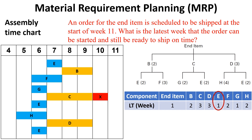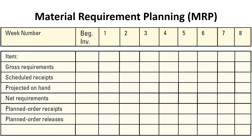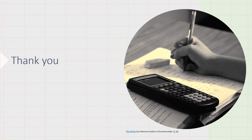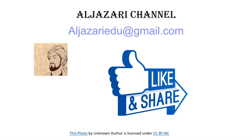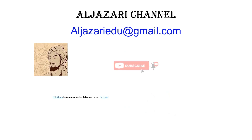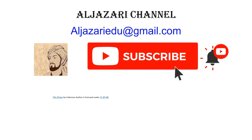The assembly time chart is finished. We can conclude that the latest week that the order can be started and still be ready to ship on week 11 is week 5. Once we find the required number of items to assemble a certain number of end items and construct the assembly time chart, the MRP can be created in the shown table, and this will be explained in the next video. Thanks for watching. If you liked this video, press like and share it, and do not forget to subscribe to the channel and activate the alarm to be notified of the new videos.